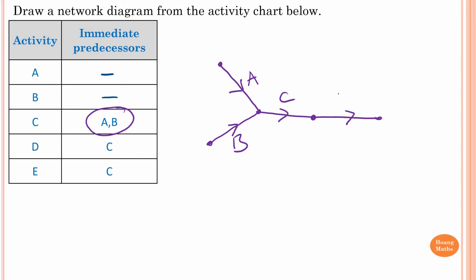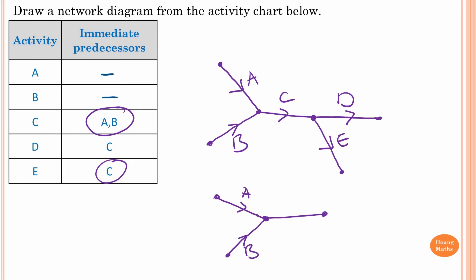For activity E, C is an immediate predecessor, so we start from this vertex and branch it out. Let me redraw the diagram to look a bit better — this is A, this is B, this is C, this is D, and this is E. It doesn't really matter as long as you get the idea and the shapes are similar.